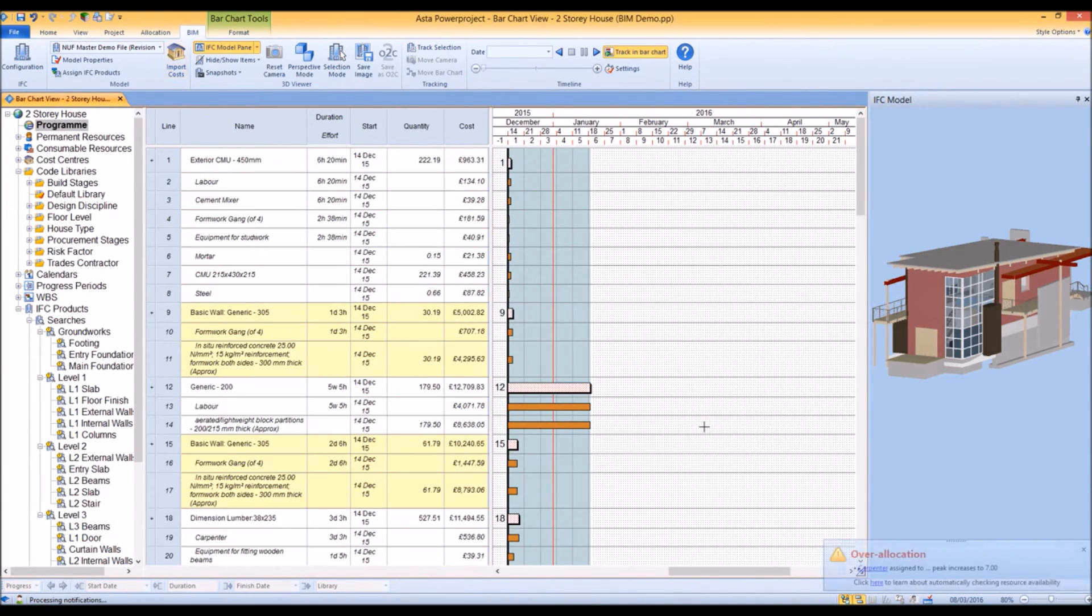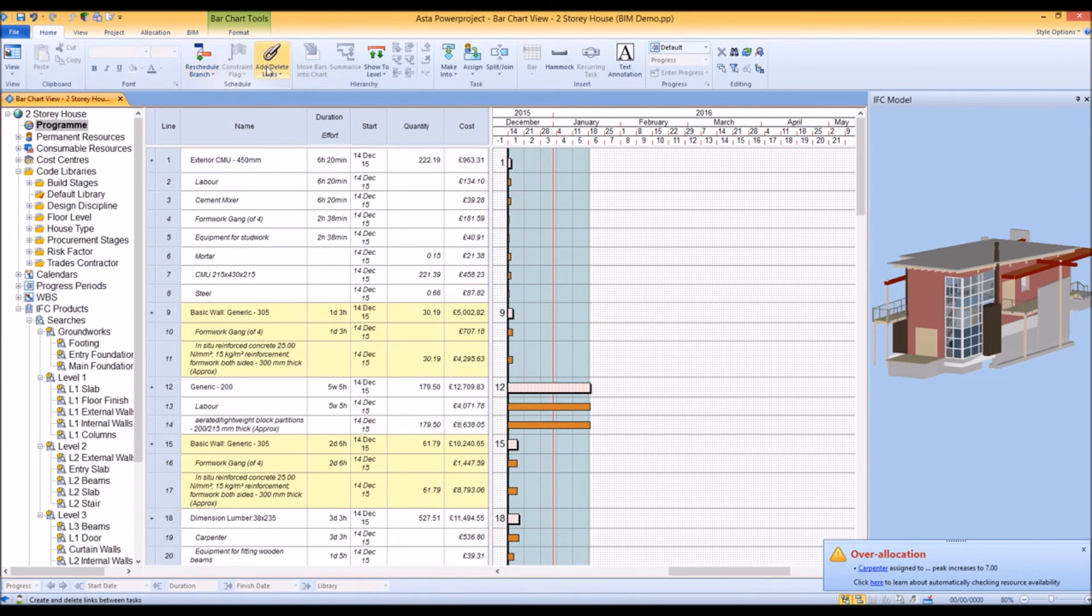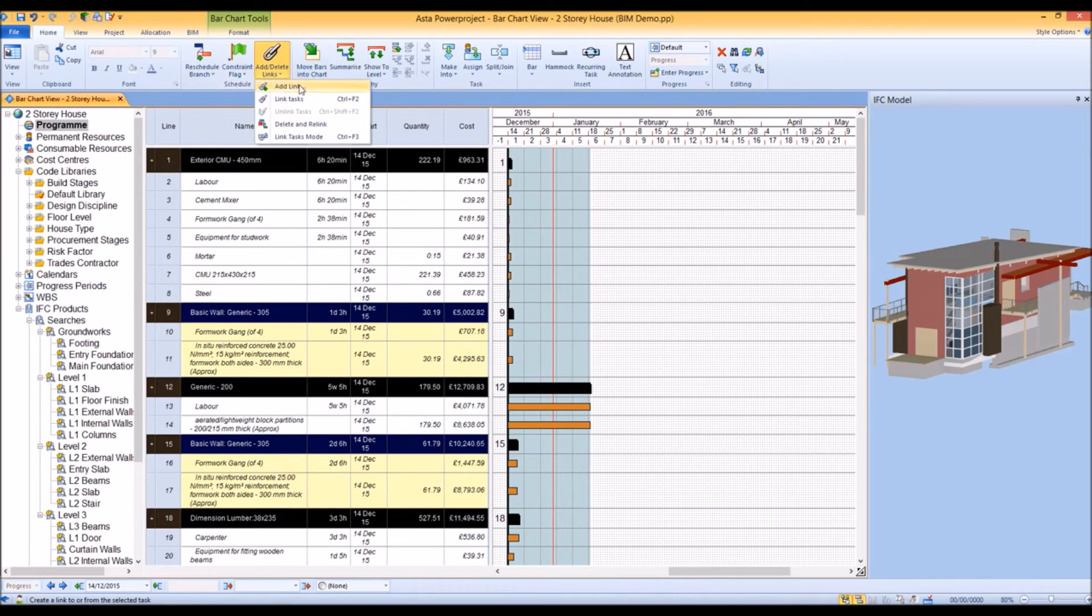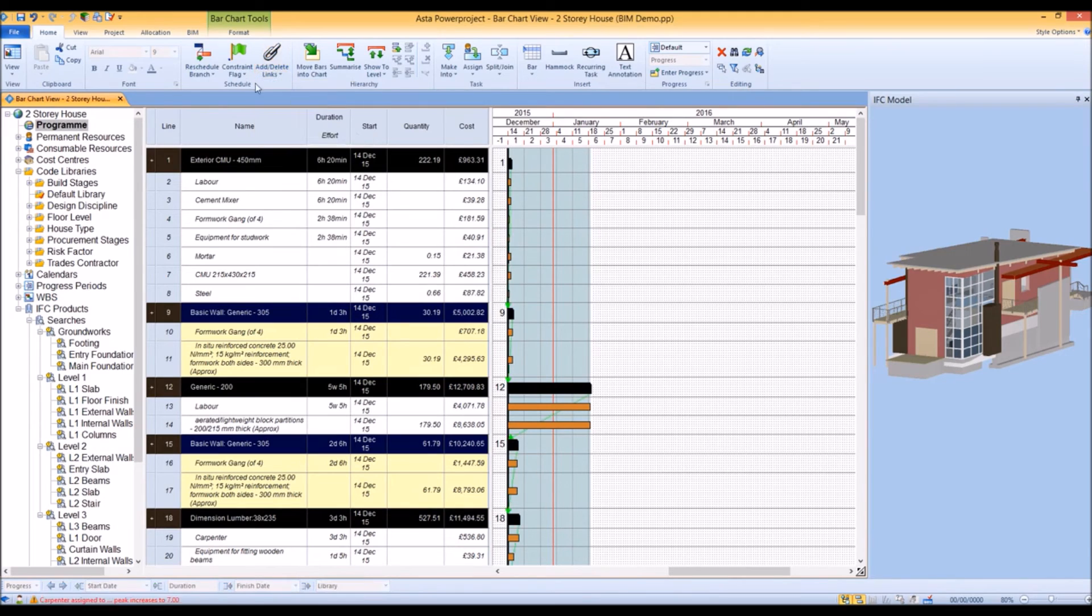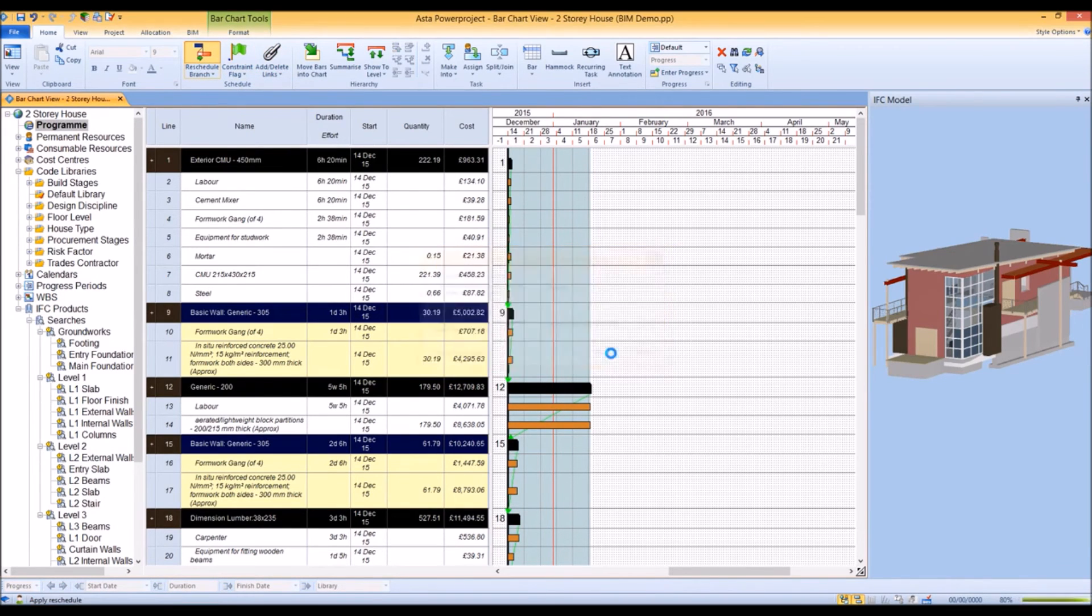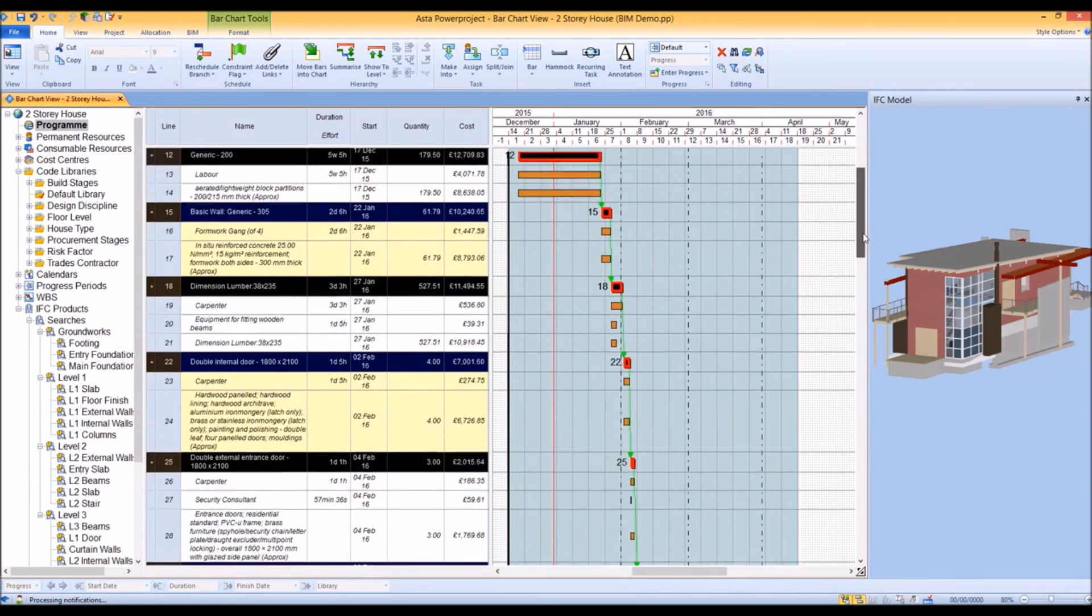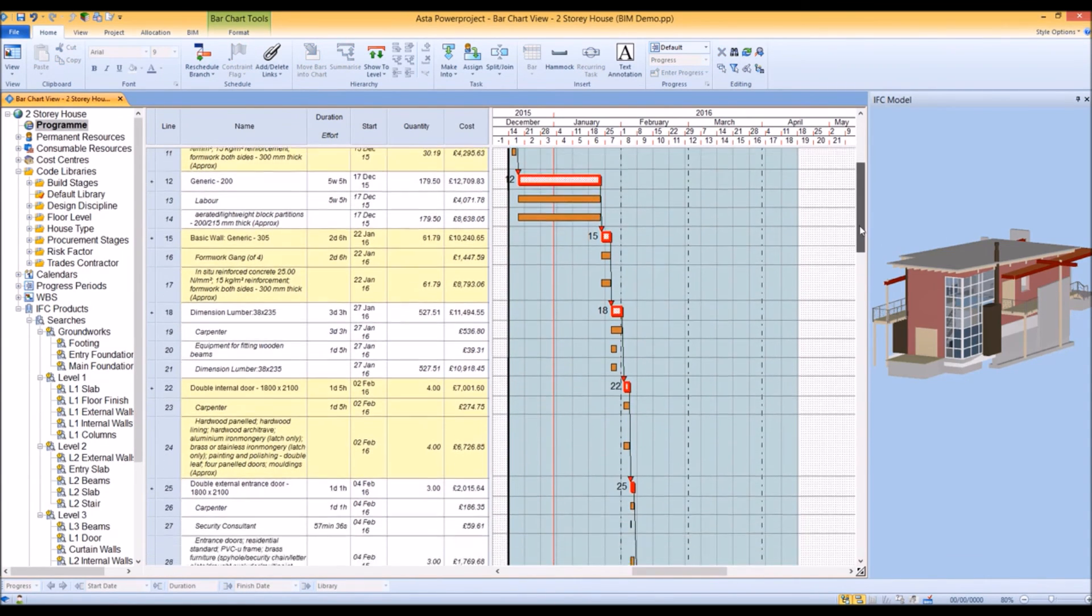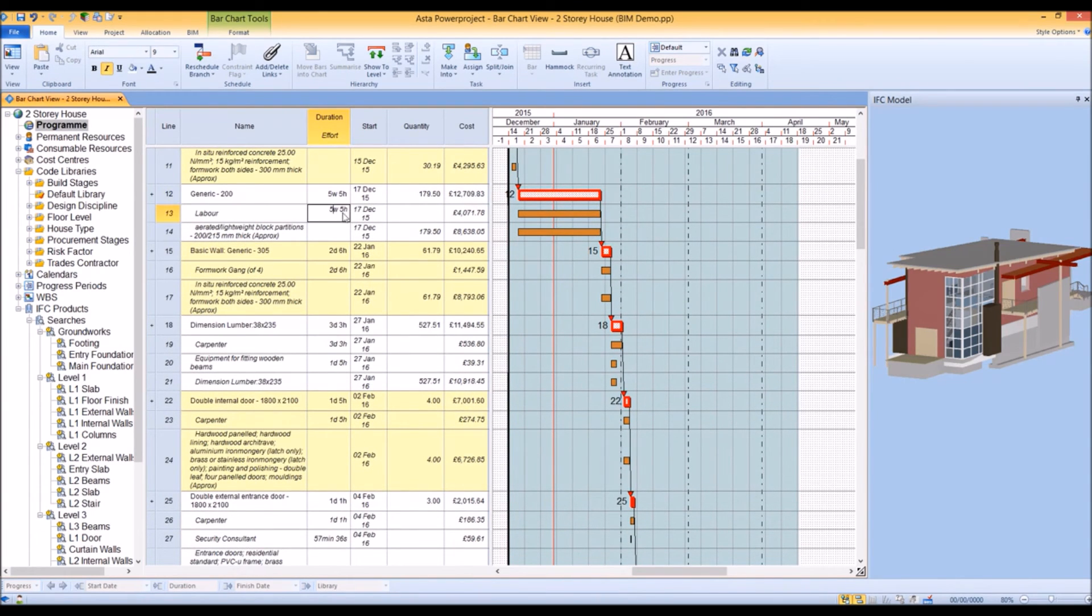When we do that and link those tasks, Power Project has created tasks and resource allocations for the correct duration - not just a standard one-week allocation per task. It's created the right duration of labor resource allocation required.